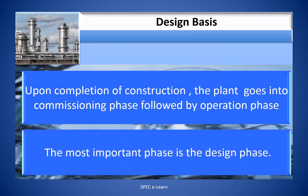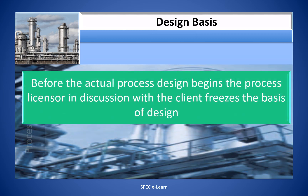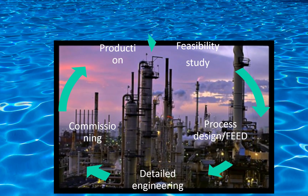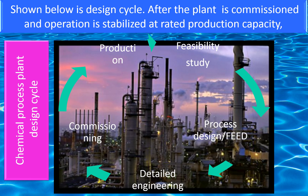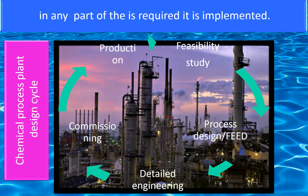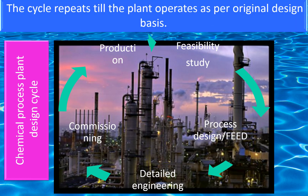The most important phase is the design phase. Before the actual process design begins, the process licensor, in discussion with the client, freezes the basis of design. This is an important document that sets the design process rolling. As shown below is the design cycle. After the plant is commissioned and operation is stabilized at rated production capacity, any design discrepancy against the design basis is analyzed, and if modification in any part of the plant is required, it is implemented. The cycle repeats till the plant operates as per the original design basis.